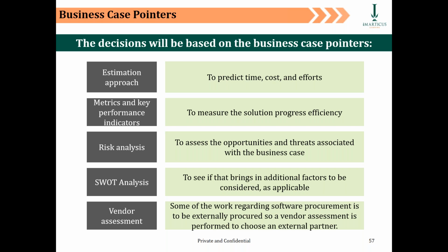Which means if my IT team develops 1,000 objects, which could be, let's say, 100 interfaces, 100 conversions, 100 reports, 200 forms, those kinds of things, not more than 3 will fail. Yeah, 997 will pass. That is the performance indicator which they want to see in your project, to feel confident that the team has set up very good, ambitious targets.